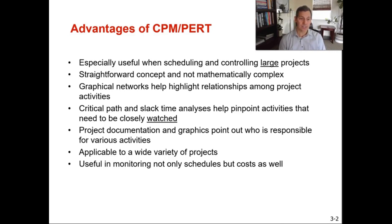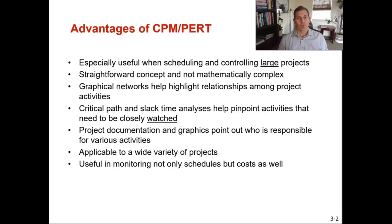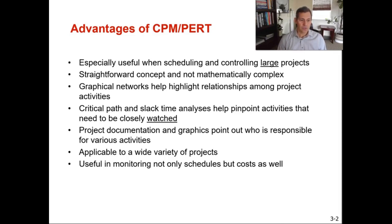The graphical networks help to highlight the relationships among the project activities. When we draw an AON network diagram, it's very easy to see what steps precede others and what needs to be done before other activities can start. The critical path method and slack time help us pinpoint the activities that need to be watched. When you're doing a project, you have to do every activity — if there are 20 steps, you have to do all 20 — but some are more critical than others. Those are called critical activities and they are on the critical path. CPM and PERT are also useful in monitoring not just schedules but costs as well. You can assign costs to every activity and track the project's finances.